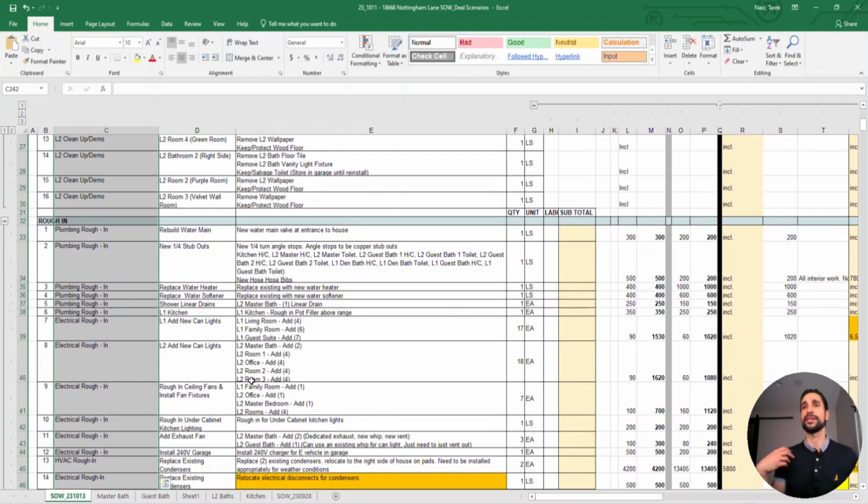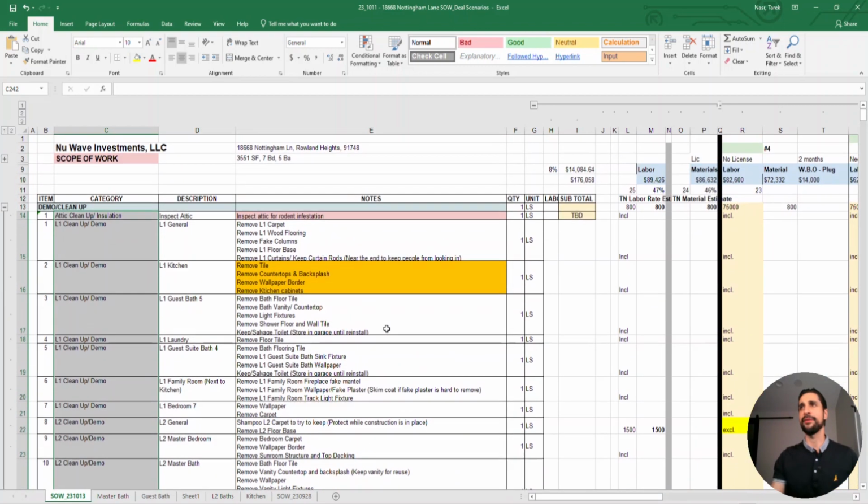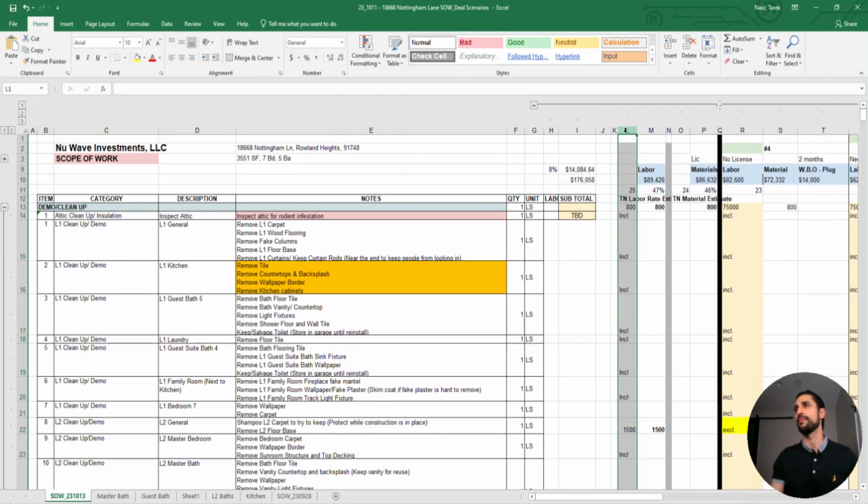I honestly want to do this for 2 things. One, I want to make sure I have the scope of work covered. And when I contract somebody, I have them sign this document, so there are no arguments of who owes what. It's clearly defined. The next important piece is that I use this list to come up with my estimate. The most important columns here are my labor column and my material column.